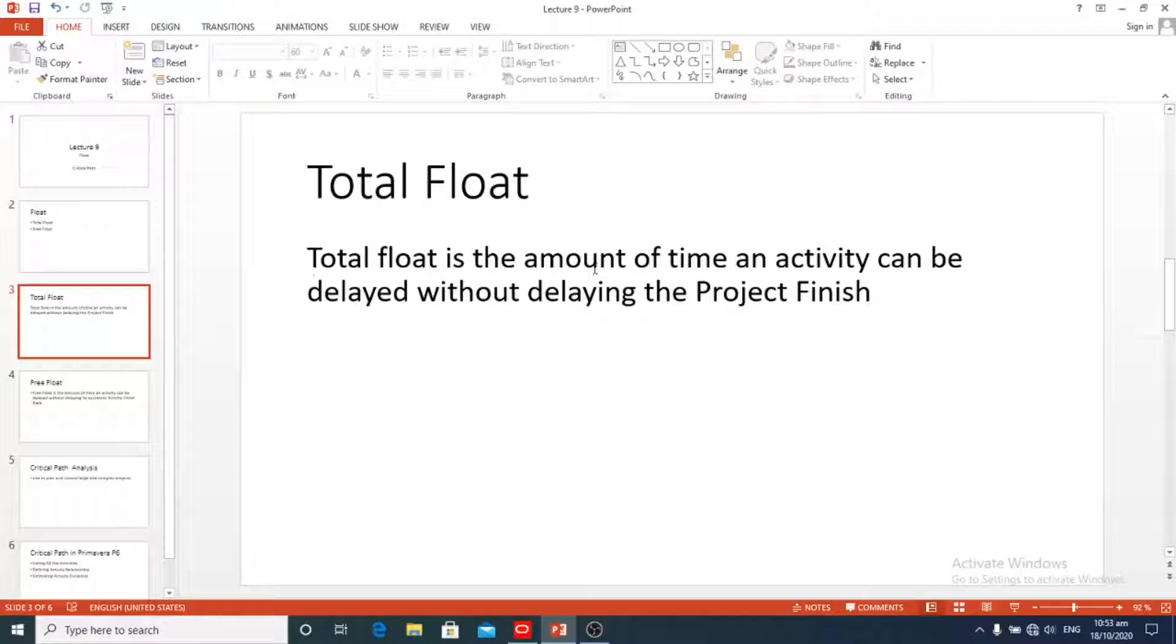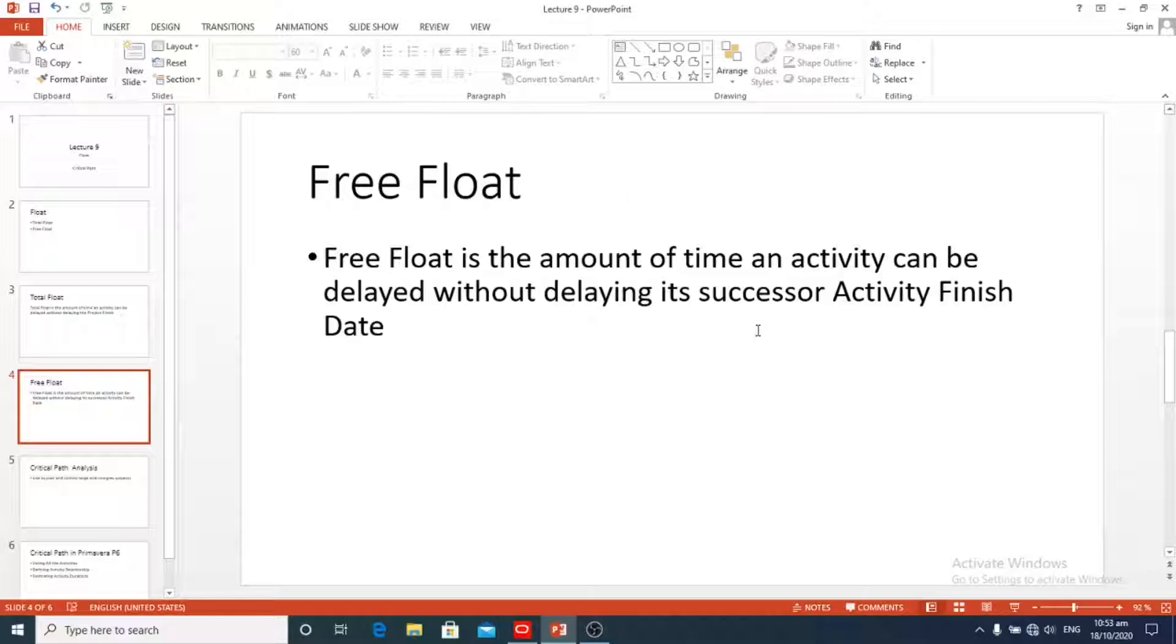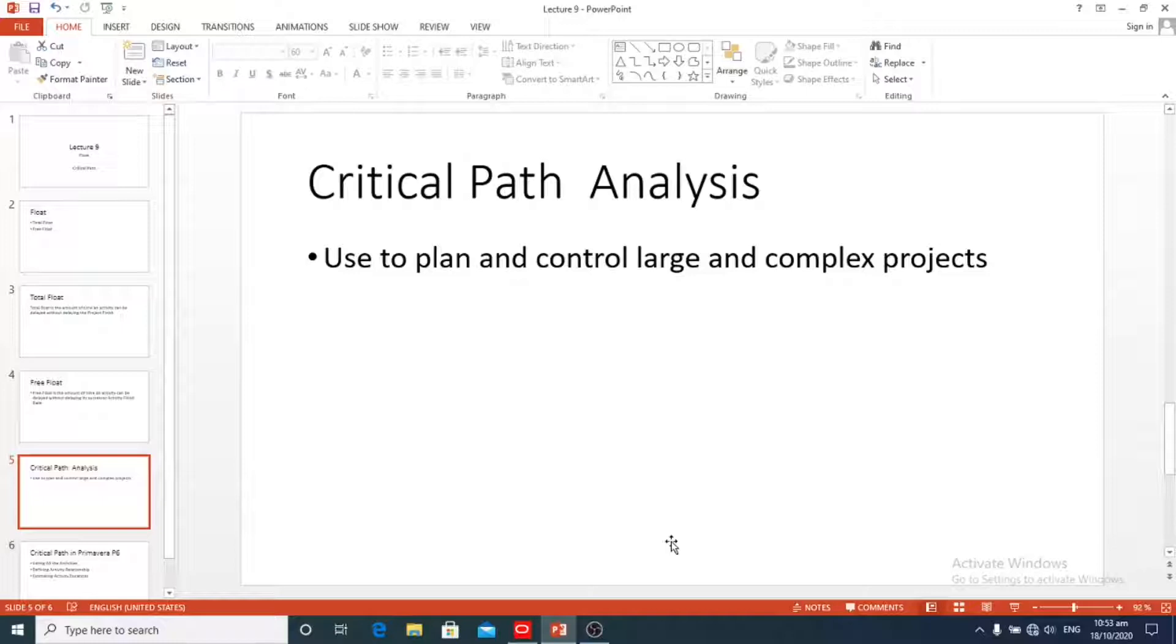Total float is the amount of time an activity can be delayed without delaying the project finish. And what is free float? Free float is the amount of time an activity can be delayed without delaying its successor activity finish date.